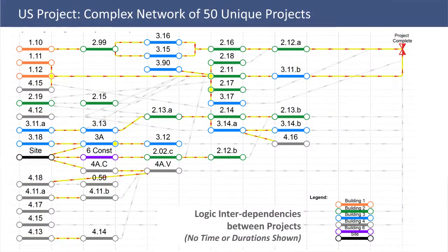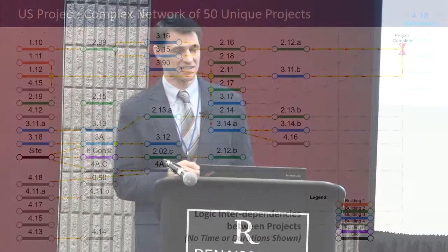We're using yellow lines, the solid lines, to indicate a driving relationship. And here we're using the gray lines to indicate a relationship that is not currently driving in our plan. The timeline, which isn't shown here, is approximately 3 to 3.5 years. This is our go-to tool.